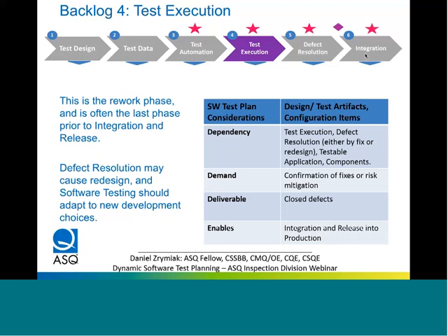The alternative is a start-to-start dependency, so that as soon as you get something that enables you to conduct that phase, you can start on that. So if a requirement is available, even before the design or the code or the environment, having the requirement enables the start of test design and test data creation.